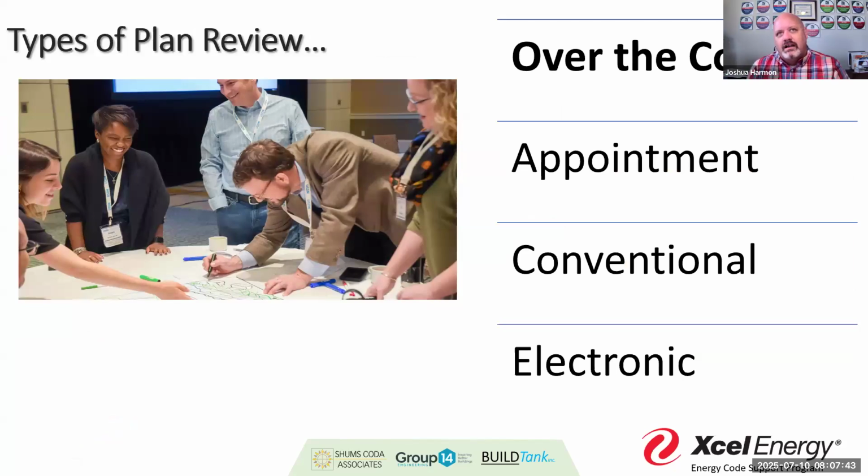We understand that in this concept of plan review, there are multiple types of plan review, right? We have 4 basic types that we generally see. Sometimes we perform what we call over-the-counter plan reviews. Those are going to be for more simple designs, right? Where we're coming in and expecting to have that conversation at the counter. We sometimes will also empower our permit technicians to assist in this process. That's where we're going to have the deck, the patio, the basement finish, the remodel, those types of conversations. Maybe some smaller projects.